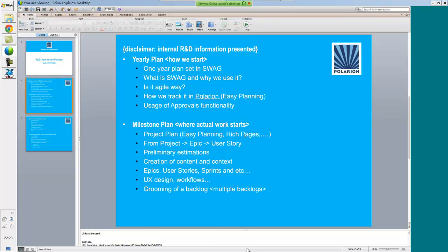And the reason why I did it is basically the calculations at the bottom, to try to understand the health of the project or how it's actually moving along. So for instance, in this case, we can see that initial estimates were for 320 days. We are already up to 340 days, which remains 224, and spent 116. So we are over the budget by 20 days, around 6%.